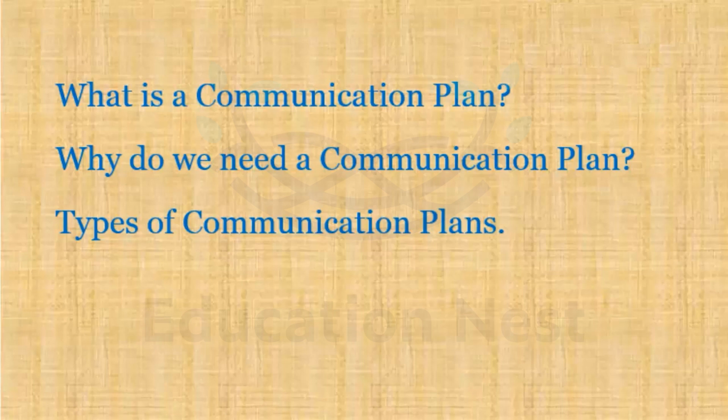The plan formally defines who should be given specific information, when that information should be delivered, and what communication channels will be used to deliver the information. Now, an effective communications management plan anticipates what information will need to be communicated to specific audience segments.